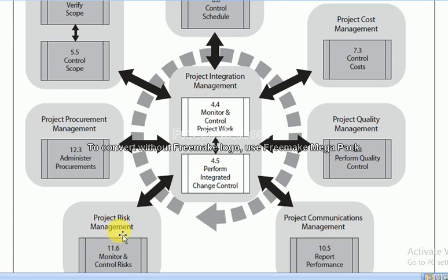For example, if the project budget is 1 million USD, then a 10% reserve can be planned to accommodate the impact of that risk. And if the project duration is 12 months, then in addition we can plan 2 months as a buffer to overcome any kind of risk that might occur during the project. So these reserves are managed in the monitoring and controlling phases, dear students. Time reserves and budget reserves as well.